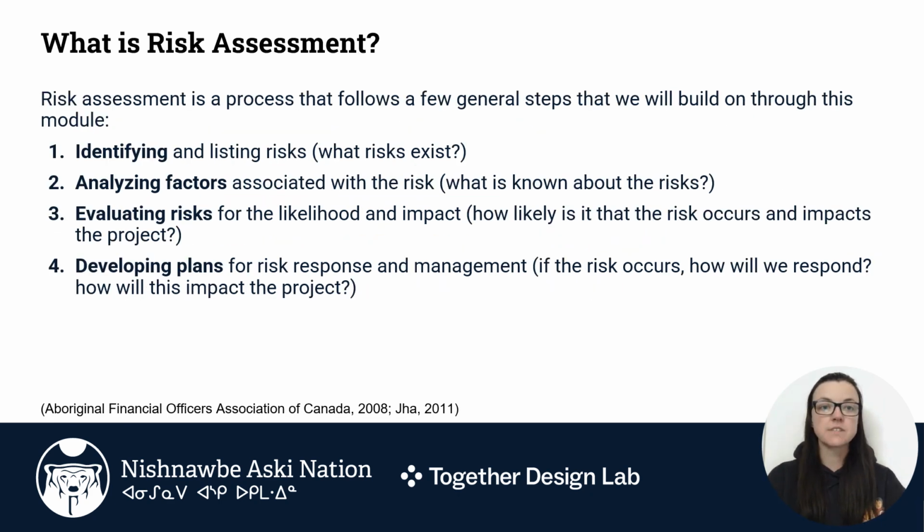What is risk assessment? Risk assessment is a process that follows a few general steps that we will build on throughout this module. First, identifying and listing risks. What risks currently exist? What risks could potentially exist within the project? The second is analyzing factors associated with the risk.